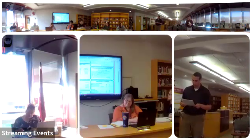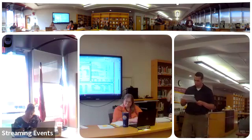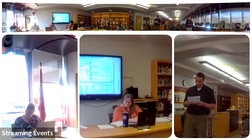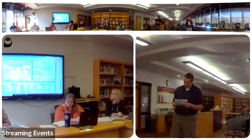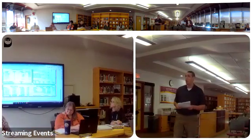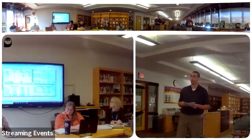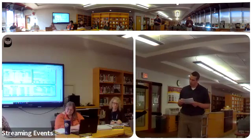Project budget, not a lot of movement here. In terms of change management, we're up to about 146 total PCOs, PCOs again being an acronym for potential change orders. And the sum of all of the PCOs leaves us with about 28% unencumbered contingency, which you'll see in this section below. We're about 71.3% paid out total. That's that bottom right number. So this is tracking well with our burn rate, where we're paid out is appropriate for where it should be.